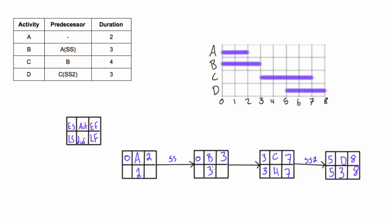Now when we're looking at how to fill out this one, well this is a regular finish to start relationship, so we'll just bring the 3 across like we have been doing in simpler examples, and 3 minus 3 gives us 0. When we're looking here, it's a start start relationship, so we don't know anything about this end date. Imagine if A was 20 days long, well this would still start when it starts. This is just a start start, so the late start has to start when the late start of A starts, so we're going to bring the 0 over, these have to be the same. If there was lag we would account for it like we did over here, 2 was the difference between 5 and 3, but it's not. We have 0, 2, and then our late finish will just be 2.